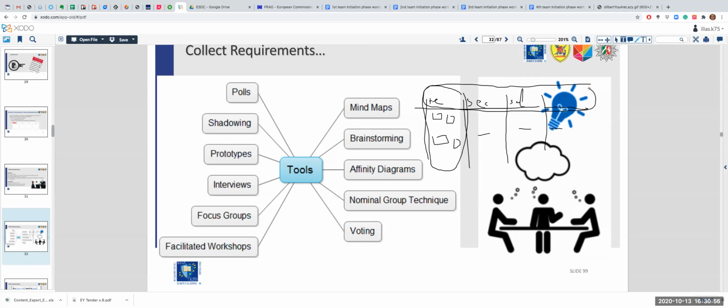If a new category pops up, you're going to put it here, and then you're going to collect the Post-it notes. Okay? Be practical. Don't let them get lost. Keep them focused. Another way of doing the brainstorming session is virtually, like the Delphi technique that I communicated to you earlier. So you use the BCC functionality of your email, you send them the emails, they provide their contributions. They don't know who else is in the communication so that they cannot be influenced.